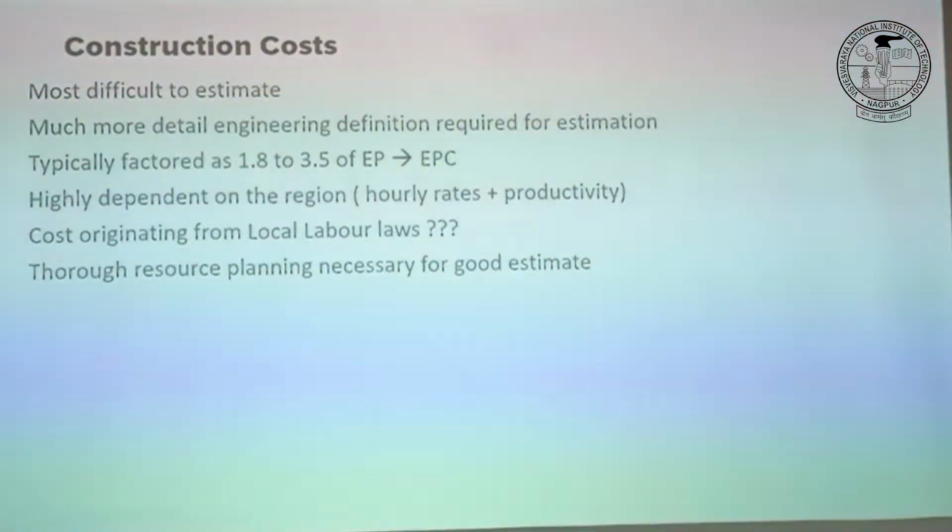So for such a system, your factor would be even 1.1, because you barely have to pay anything for your construction apart from this structure or foundation, right? But for some equipment, they will send you only the vessel, and then you yourself apply the insulation, cladding, many things you do yourself.